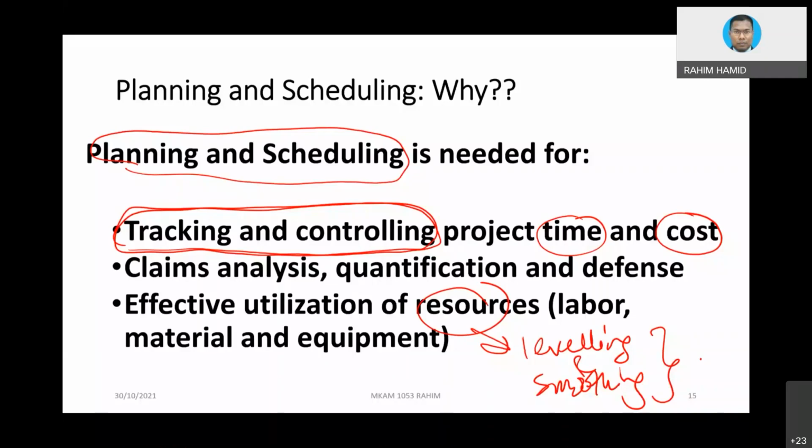Not to mention a mobile crane, which has to move around, and it takes a lot of time to set up the crane at that particular spot. So if that kind of thing happens, what could be your solution? That is something you would only be able to see once you come up with the scheduling, for proper utilization of resources.